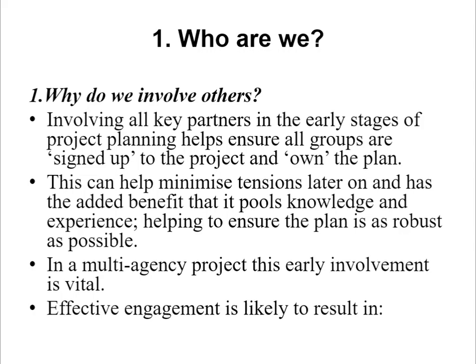Now let's discuss the 7 core questions in detail, starting with the first question, who are we? Here you need to know the reason why others are involved. Ask yourself, who do I need to involve, and undertake a stakeholder analysis. Involving all key partners in the early stages of project planning helps ensure all groups are signed up to the project and on the plan. This can help minimize tensions later on and has the added benefit that it pulls in knowledge and experience, helping to ensure the plan is as robust as possible.